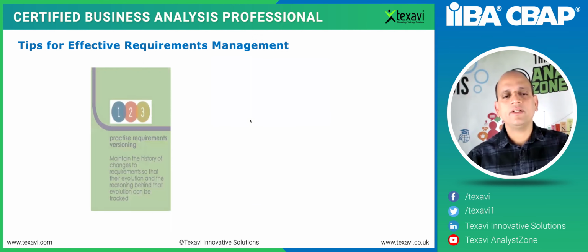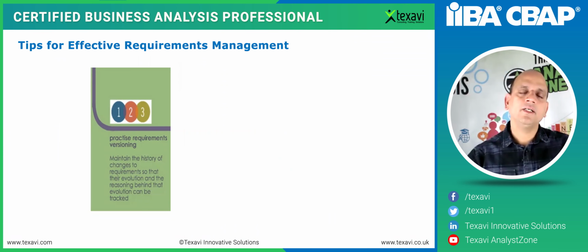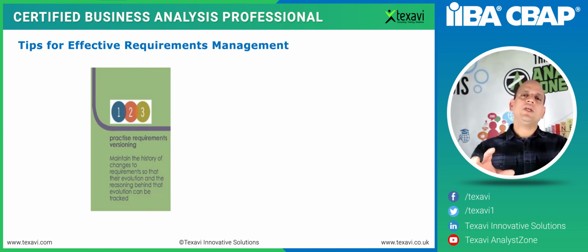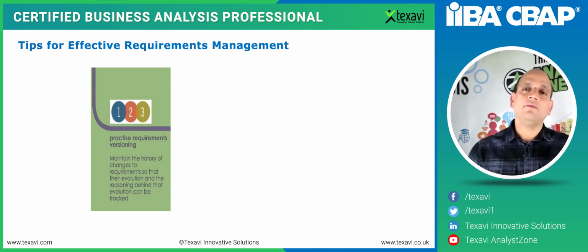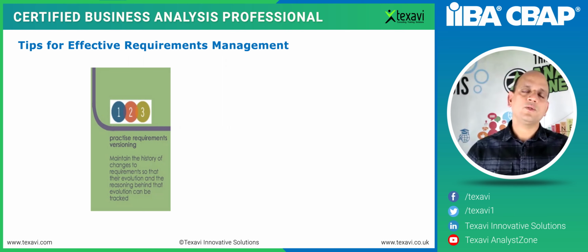So, and then again, once you have got that, you need to start looking at the requirements versioning. That's where we say have an ID for each of the requirement, and then for that one, again, traceability also would come in from there, right? So if you know which requirement has changed, you can easily go there. And then the version of the build, not just the requirement, even the versions of builds are maintained. So whatever you release, that's what we were talking about.